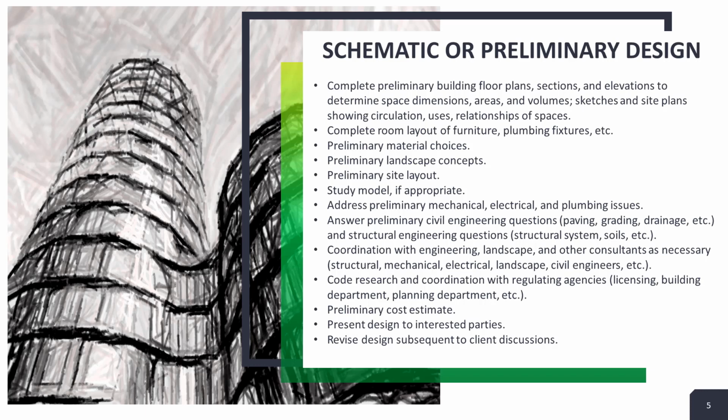The schematic design will address all significant areas of design and will be reviewed with the client before proceeding with more detailed drawings. A preliminary cost estimate is also usually provided at this stage.